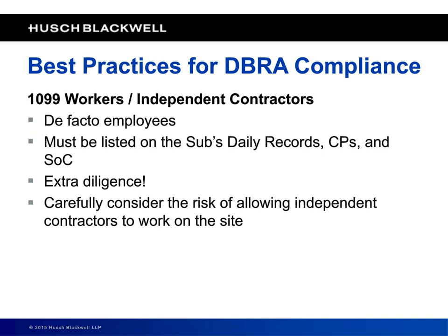If you run into a situation where somebody is claiming to have independent contractors, say that's great, list them on your certified payroll, list them in your statements of compliance, and list them in your daily reports. I want to see them. I need to know who they are. I need to know how many hours they work, and I need to know what classifications they work, and I need assurances that you're paying them Davis-Bacon Act wages, because you cannot contract around Davis-Bacon Act compliance.